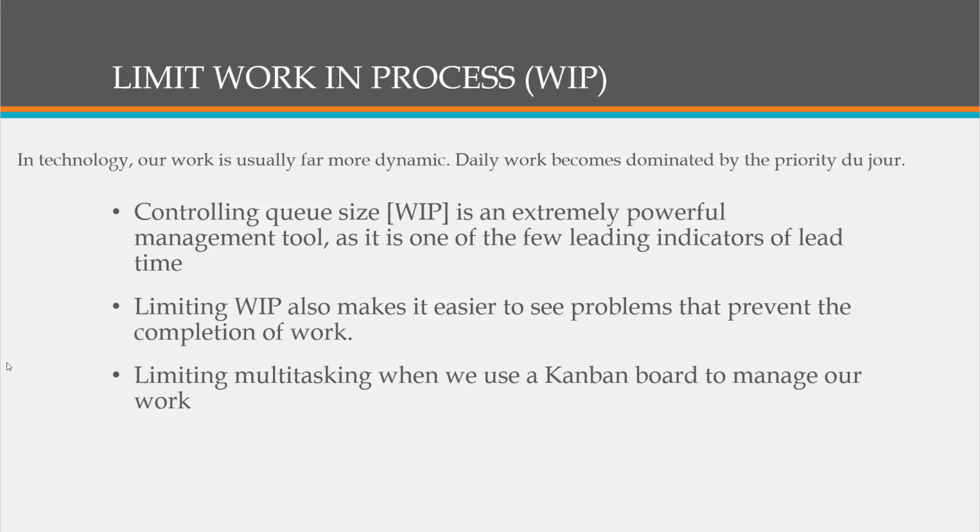If a worker has too many pieces that they're working on, then they tend to multitask, and that causes production issues. So by limiting the number of work in each of these columns, workers tend to be more productive.